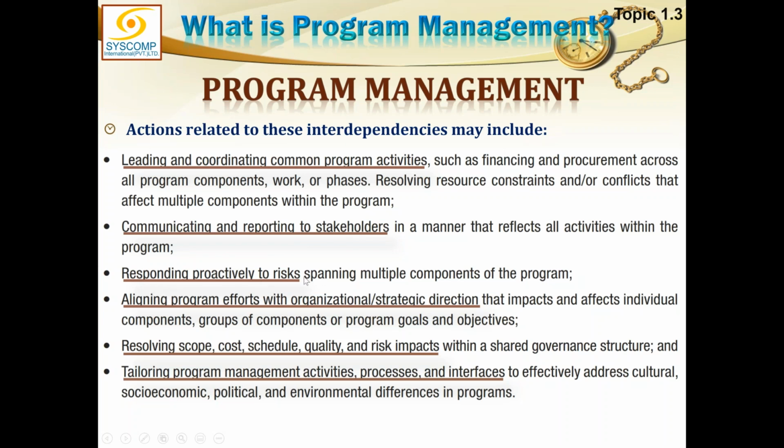Responding proactively to risks spanning multiple components of the program. Again, I would say risk management is the responsibility of component projects and subprograms. But if there is a commonality of risks, if the same risk is affecting more than one project, that risk has to be taken up by the program manager.